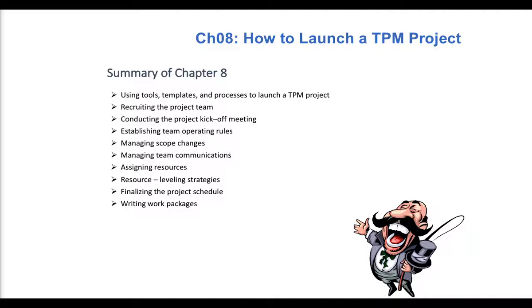So launching the project, you need to get the project team, you need to have a kickoff meeting, establishing the rules, you need to manage scope changes, team communication, you need to make sure you assign the appropriate resources to each of the work packages in the work breakdown structure. If people bite off more than they can chew, then you may need to do some resource leveling so that people aren't booked for 500% of the time.